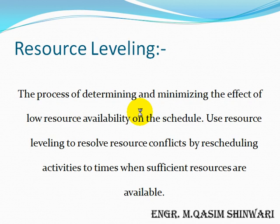While Resource Leveling is the process of determining and minimizing the effect of low resource availability on the schedule, we use Resource Leveling to resolve resource conflicts by rescheduling activities to times when sufficient resources are available.